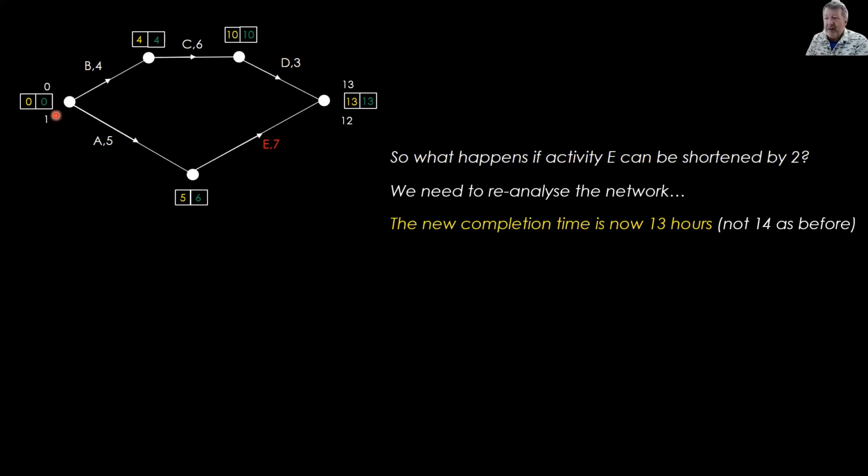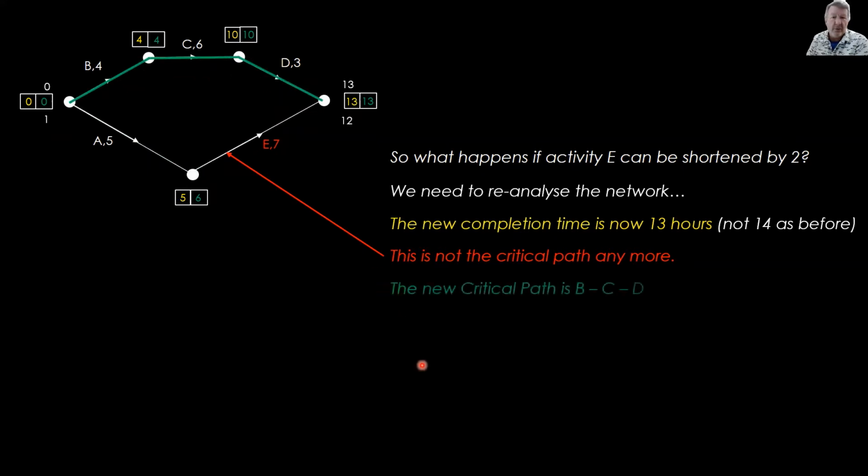So what we have here, remember this one down here was the old critical path. Where is it now? It's not anymore because we have float time here. The numbers don't match. So 0, 4, 10, and 13. Well, let's draw it. 0 to 4, 10. There's our new critical path, which is labeled activity B, C, and D, or just written like this down here.